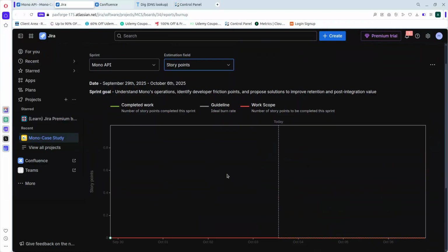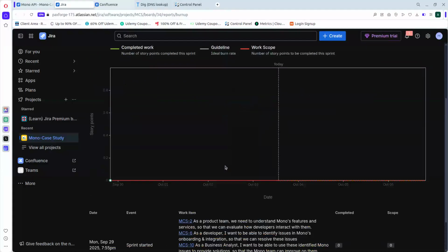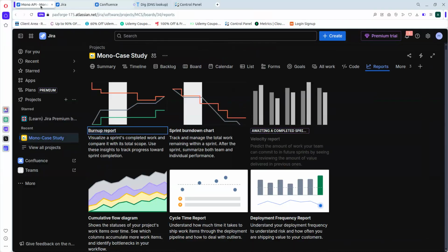Another thing is it helps the business analysts push back on stakeholders who keep sneaking in just one more feature. Once the sprint has commenced, we cannot update the sprint. We need to complete what has been done there before we can add anything. It doesn't mean that you can't add. You can actually go back to the backlog and add.